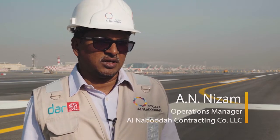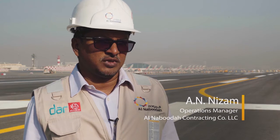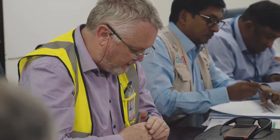For this particular project, we decided from day one that every morning at 6:30 and every evening at 6:30 we have the stakeholder meetings. In that we brief what is going to be happening that day and what went wrong or good in the last shift. With that, we get a lot of assistance from the stakeholders, especially for any works outside our limits.